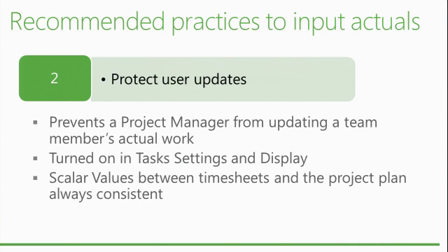It should keep basically the way the data was entered by the user, and it should flow through the system. But it's true that if you enter 32 for a week, Project Server is going to take that, and if it's time phased by day, for example, it's going to split and spread the actuals. And sometimes, because you have calendars that have different rules and things like that, it may vary a little bit the way it distributes the hours per day.